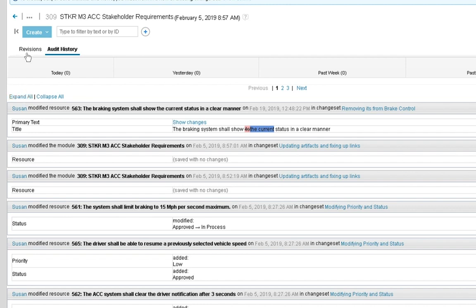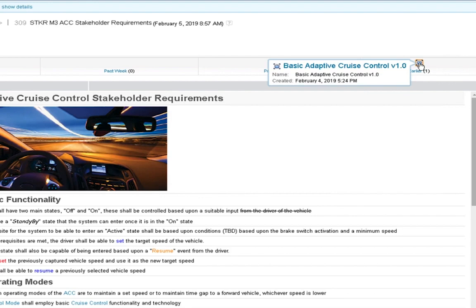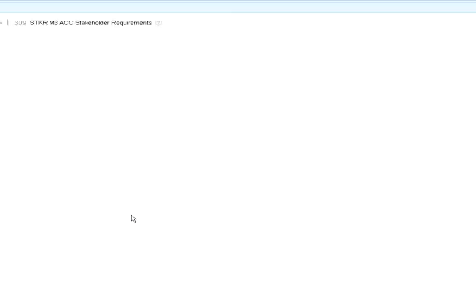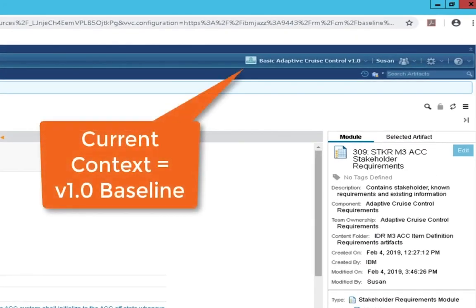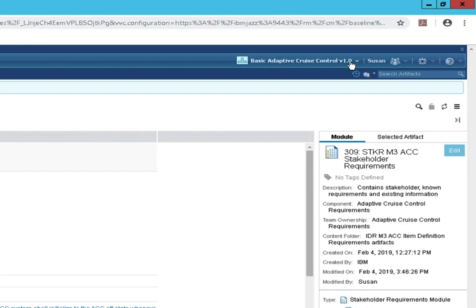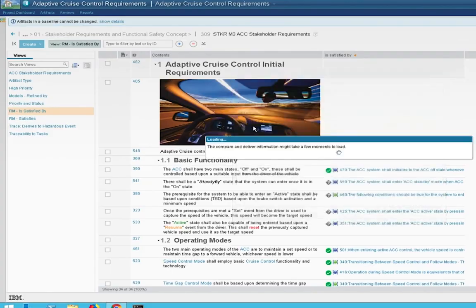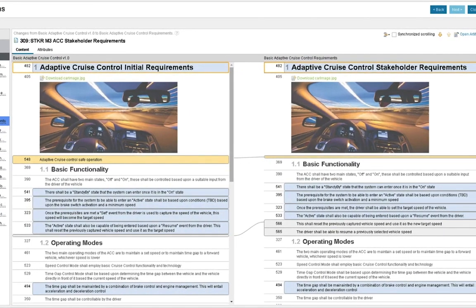without any manual intervention. At any point in time, a baseline can be created, an immutable version of the state of the requirements at that time. Baselines are all about getting to a common base agreement between stakeholders, setting the right expectations, allowing us to manage the scope of the requirements, and also paving the way to setting schedules. In the IBM solution, you can even compare baselines, either to other baselines or to the current state of work.